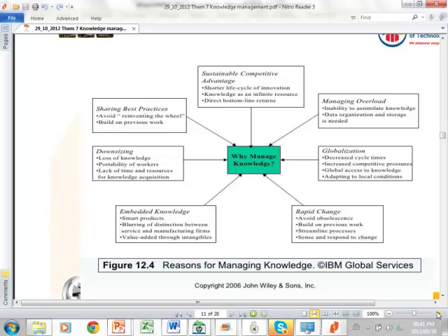Okay, so we don't want to overload people with knowledge, but we also want to put enough pointers there so that people can pick up and say, oh, okay, keyword, electrical cabling in the foundation. Okay, there was a problem on the civil side last time which might affect my cabling this time.